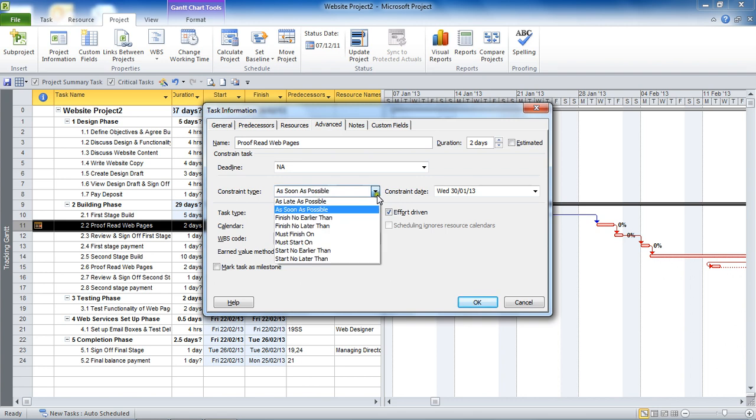So the as soon as possible constraint is applied to every single task of this project at the moment, and that is because the project is running from the project start date. So they all run as soon as possible, which is why that is not really considered a true constraint. It's applied to all of them.